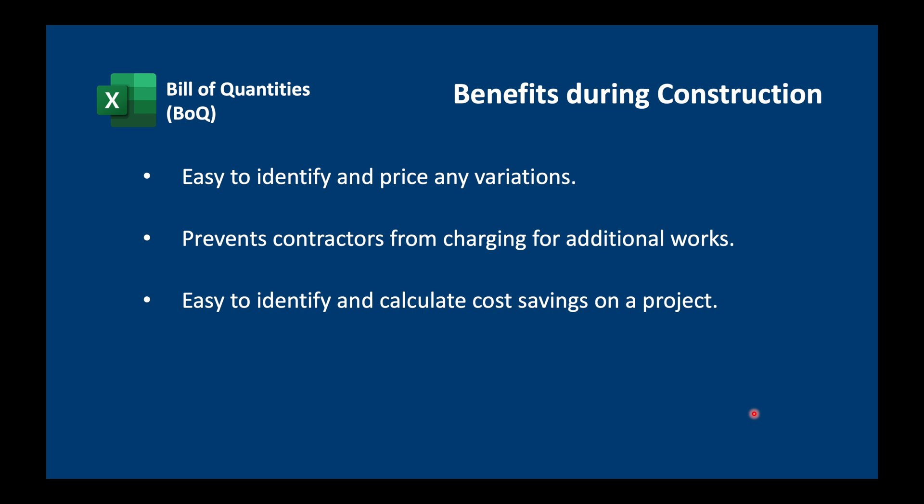During construction, it's easy to identify and price any variation. If our borehole is not as deep or deeper than expected, it's easy to adjust in the final bill of quantities. We can also prevent contractors from charging for additional works, since everything needs to be included in the agreed BOQ. It's also easy to identify and calculate cost savings — if we're going over budget, we might reduce the pumping test from 72 to 24 hours, for example. And it helps us to assess and approve contractors' invoices, which should be based on the bill of quantities.